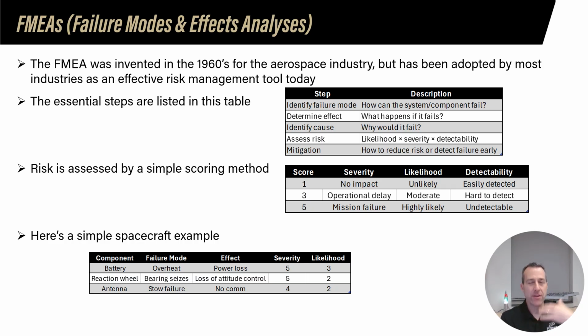And as you think through those failure modes and what the effects might be, you should have a sense of two of the same things as the risk management section, the likelihood and severity, but also the detectability. Like, how do we actually know? Is it detectable or easily detectable or not? And then there's a way to compute it through the FMEA analysis.